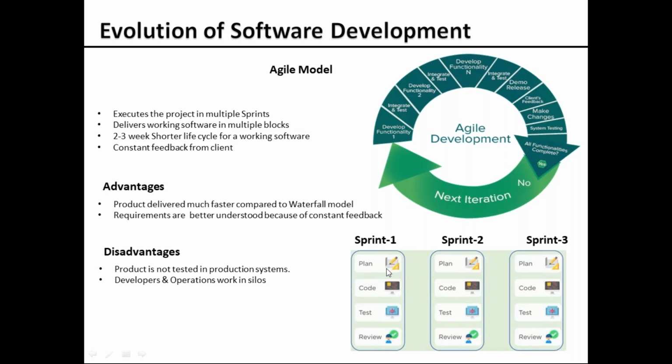Let's say he says, okay, in these two requirements I need a small change, in these three requirements I need a small change, why don't you make this change for me? Since this is not a complete software, we have picked only three of them. So in the next sprint we're going to add the client's new requirement into sprint 2, and we'll work on it.